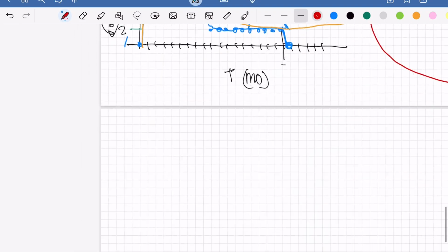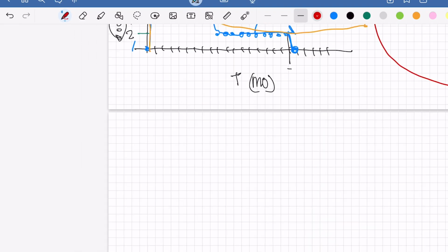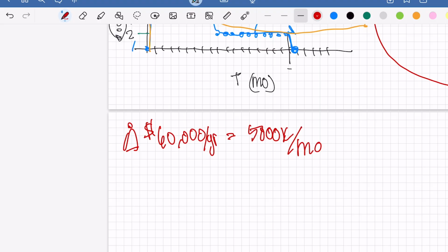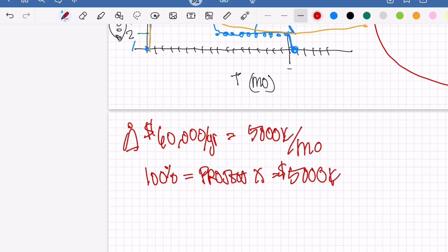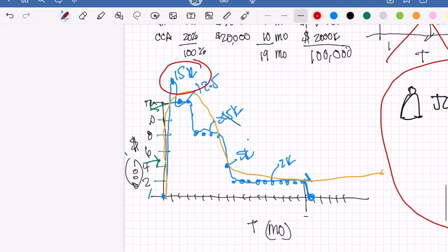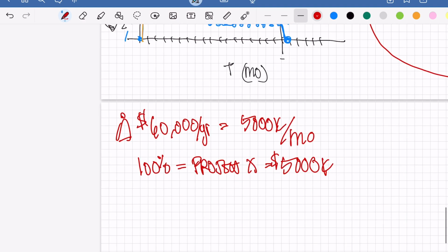and let's just work down here. So Joe is a $60,000 a year person. He magically turned red now, which means generally he's $5,000 a month for staffing. So if Joe worked 100% of his time on Project X, he would be $5,000 a month worth of labor. Well, it's kind of an issue because we already said, whoa, we have $15,000 in schematic design. So we have to find a few more friends for Joe.